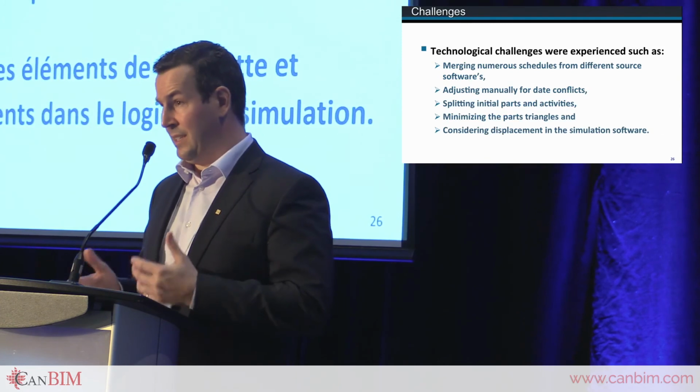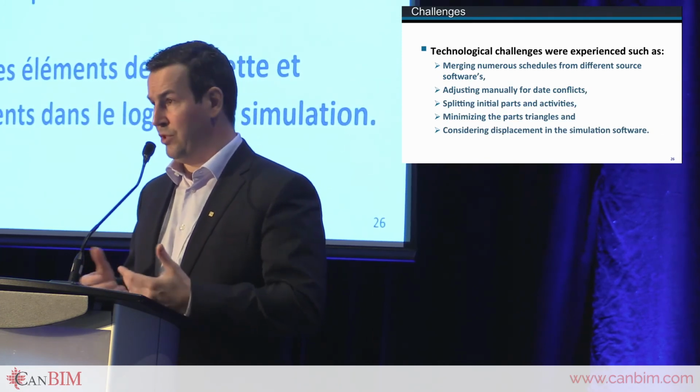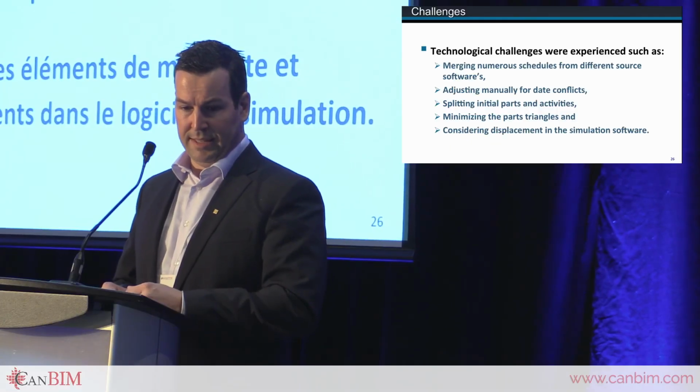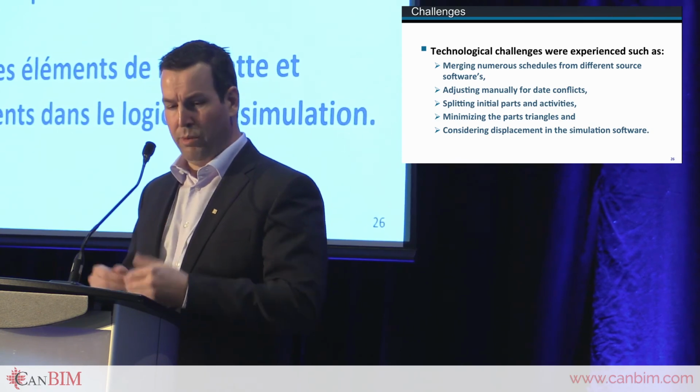In terms of challenges, the challenges are to integrate multiple different schedules from different sources and of different formats. That's always a challenge, as well as to manually adjust for interferences. That's another challenge. Splitting the model elements to the right level of detail with the scheduling activities, that's a major cause of effort.